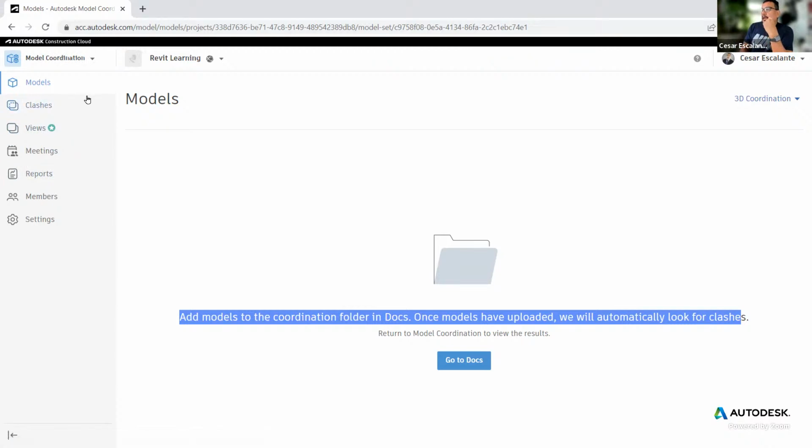All right, so in the context of project production, somebody needs to take the role of 3D coordinator. And that's a role that involves several tasks, including making sure that everyone exchanges the files on time, and making sure that everyone puts the model in the appropriate coordination folder, and then studying the issues, assigning responsibilities, and keeping control of the resolution progress.